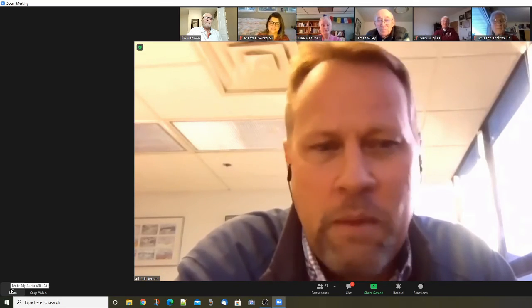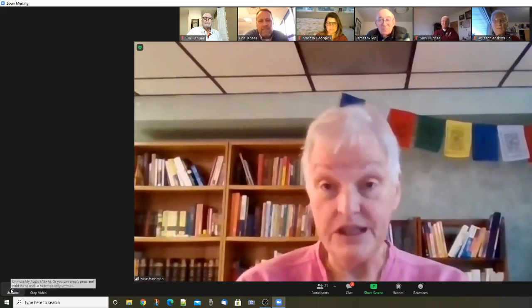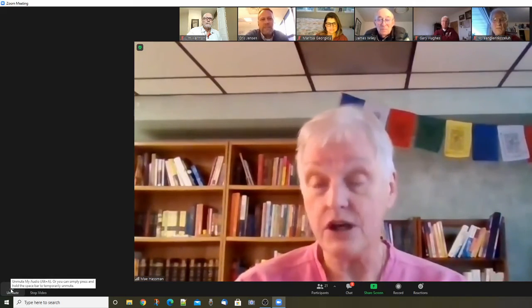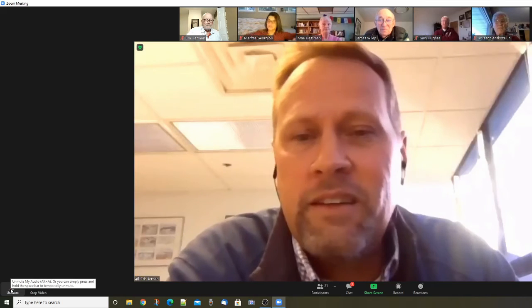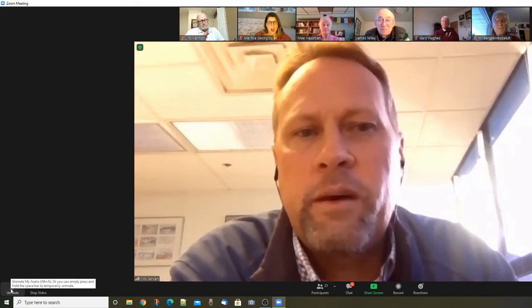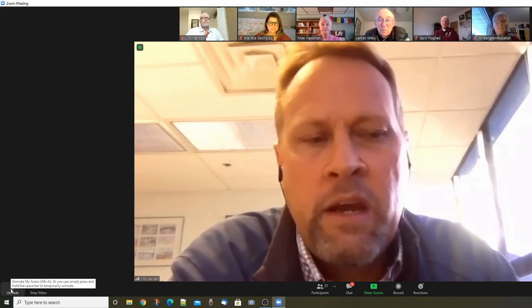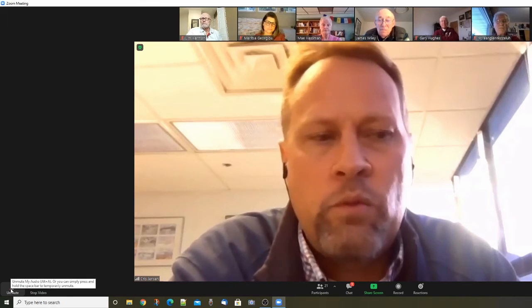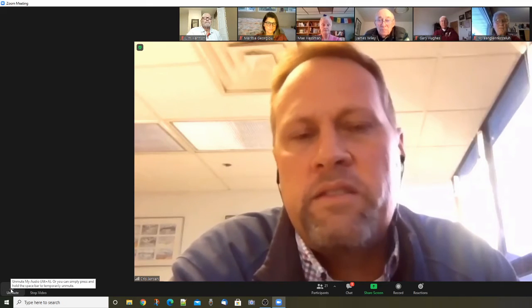What else did I forget, May? I'm sure there's more. The other thing that impressed me from the very beginning was the fact that you hired the contractor before you had your plans. You might talk about that part a little bit and what it meant. Yeah, so that's a little bit unique. We're using what we call GCCM, or General Contractor Construction Manager method of delivery, which means we did exactly what May described. We hired the contractor before we actually completed design of the project.